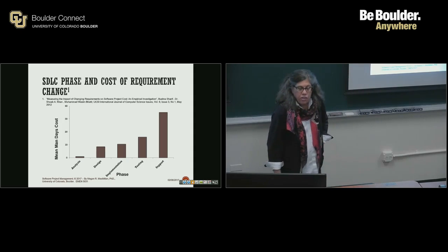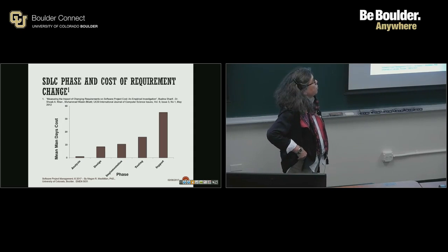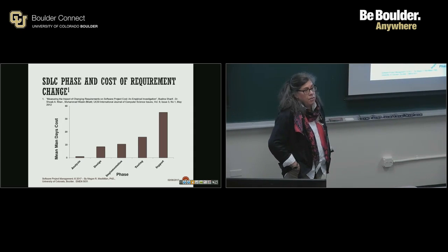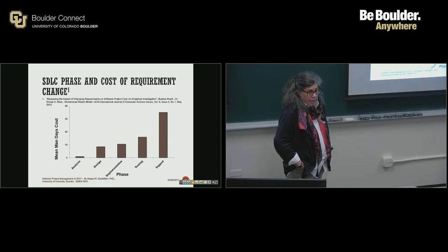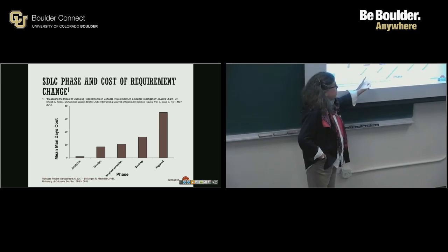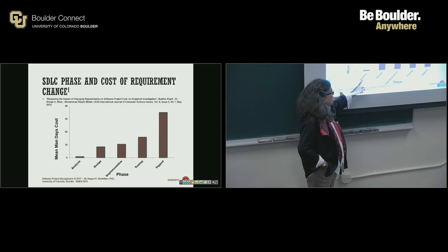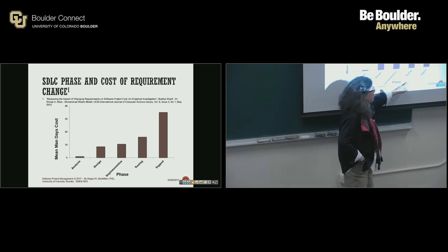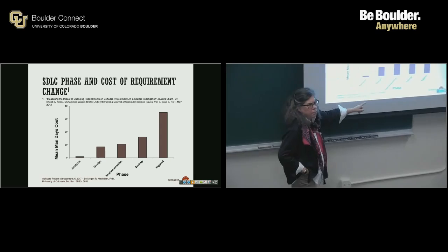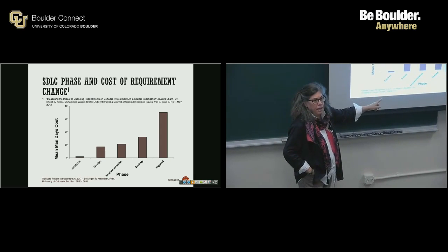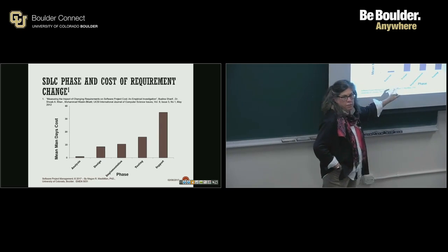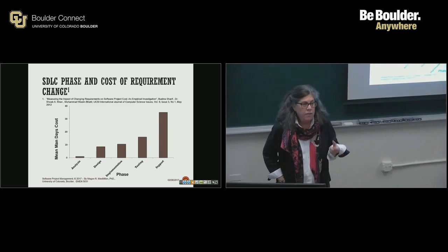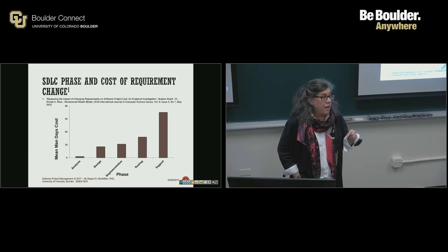So if you look at the cost of requirements changes, this is one reason we've gone to iterative or incremental methodologies, because when you do it as a waterfall, this is one of the issues with waterfall. When you do your analysis first and then design and implementation, testing and support, if I change a requirement in analysis, not a big deal. If I do it in support, big deal. So again, if you get them in smaller sprints and do it right along, it costs you less to make those changes. It's not free.